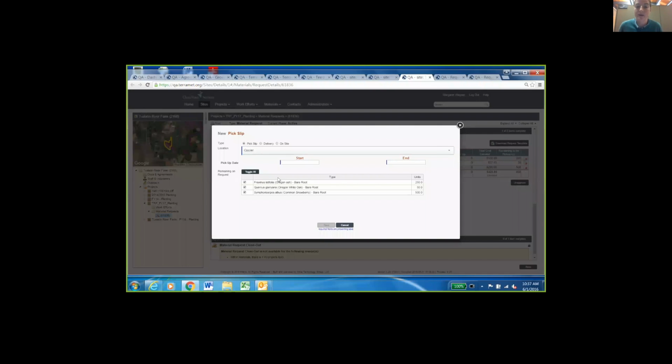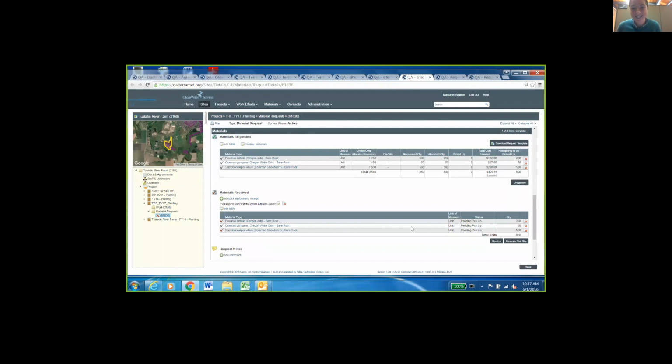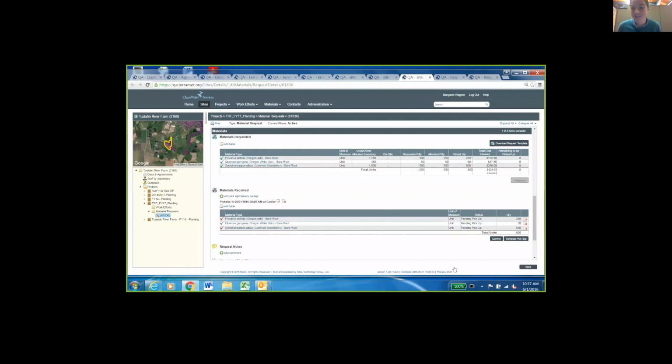We're going to make them all pick it up at once, toggle that on. They're picking up today as well. Once again, not logical because it's June, but that's fine. And then you can generate a PDF in this case. This is nice. This is telling me, oh, wait, you don't actually have all this stuff because I didn't deliver those species. So even though I have them available to allocate and as projected in inventory because they're expected, they haven't been delivered yet, so they're not on hand.